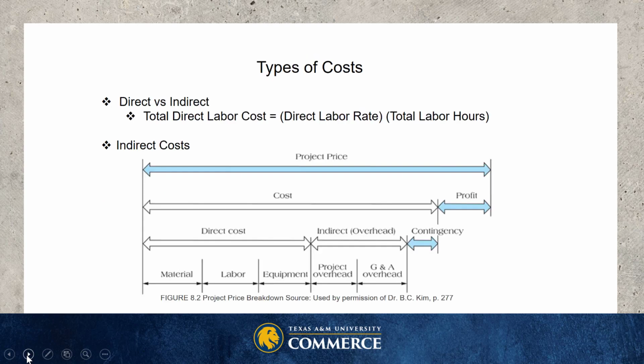We have different ways to examine project costs by investigating the nature of the costs themselves. Various forms of project costs are those related to type, direct or indirect, frequency of occurrence, recurring or non-recurring, the opportunity to be adjusted, fixed or variable, and schedule, normal or expedited.